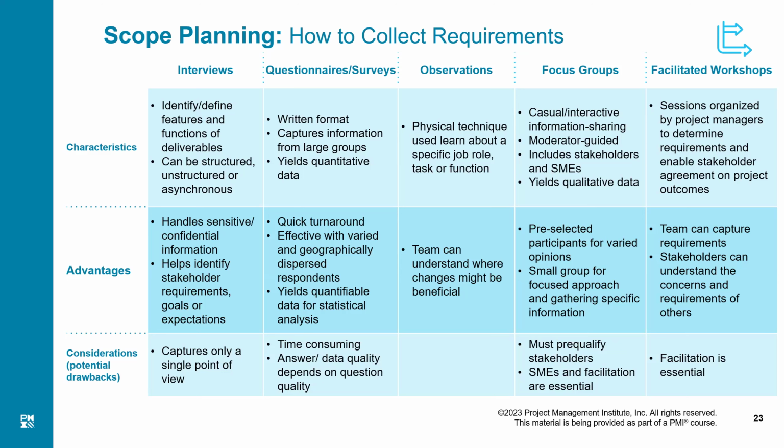But the wideband Delphi is a modern technique in which we apply this long elaborate process, which could go on for months and months, but we want to make a decision in 30 minutes. And we want to discuss only with the people present. We ensure that all the subject matter experts are there, like in a focus group or a facilitated workshop. We can apply wideband Delphi.